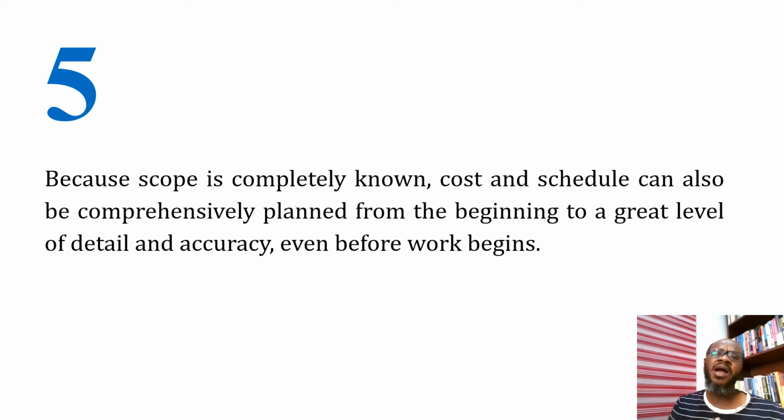Now, when we talk about the scope of the project, we are making reference to the deliverable with its features and functions, as well as the work that goes into creating that deliverable with its features and functions. So that is the scope of the project. If you can quantify the scope, it's a lot easier quantifying the cost and the schedule, because the scope controls many aspects of the project.